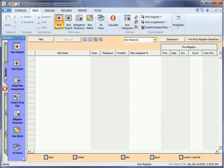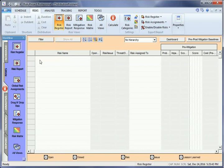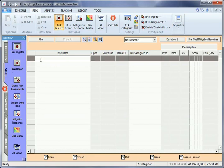To add a risk, left-click in the first row of the Risk Register and type in a name. This adds the risk to the Risk Register.